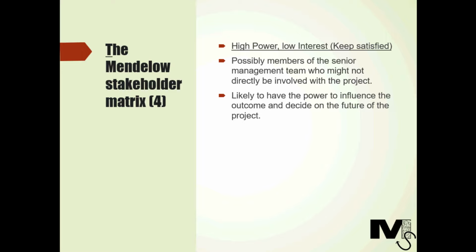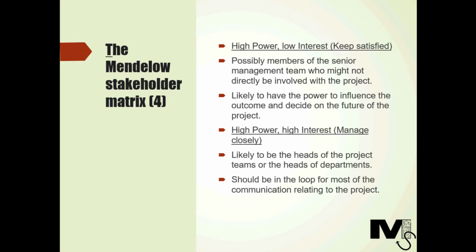It is very important, therefore, to keep these stakeholders updated and happy throughout the life of the project. The updates can be scheduled on a routine basis, like monthly or quarterly. So these are stakeholders that need to be kept satisfied. High power and high interest.